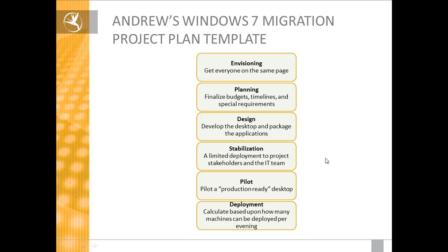An important part of that too is to document those decision points. So one of the things that'll bust the budget is someone forgets that they told you that they wanted to have the arrow options turned on in Windows 7. That was a priority, and then the design team is working around that, and then why did we do this? So just getting everyone together, kind of sorting out what everyone wants and getting it on paper.